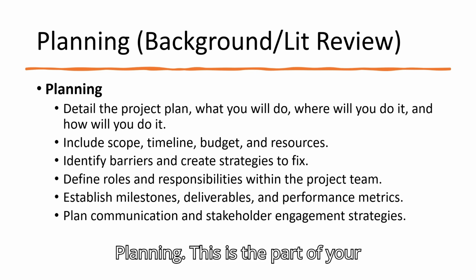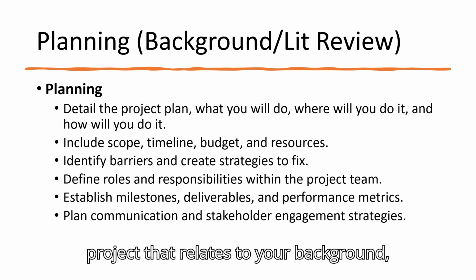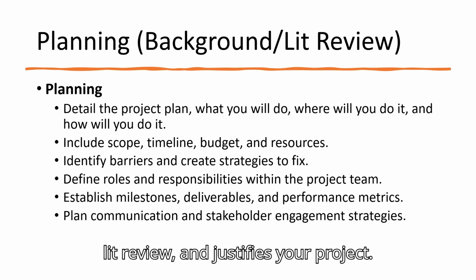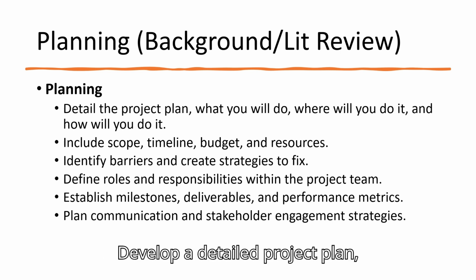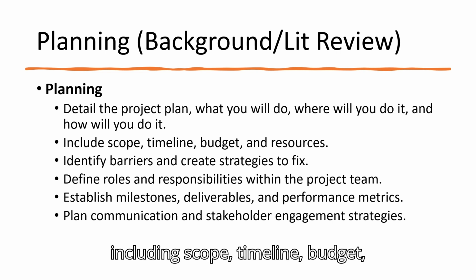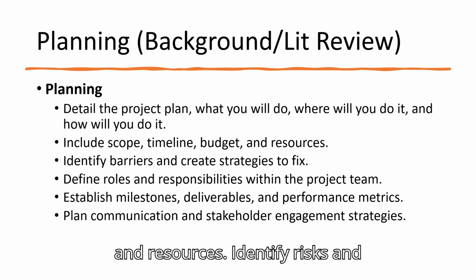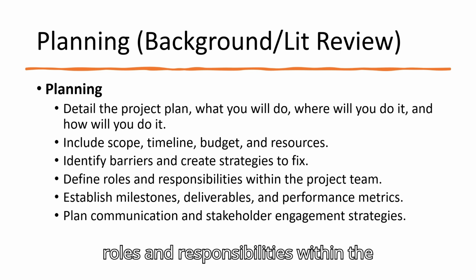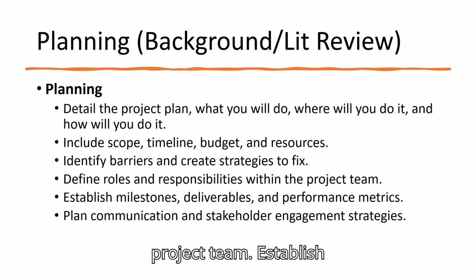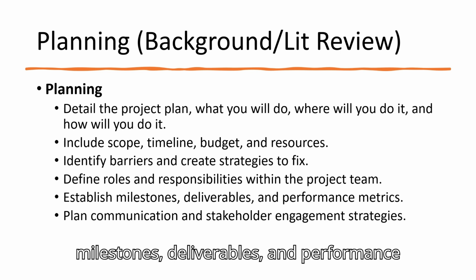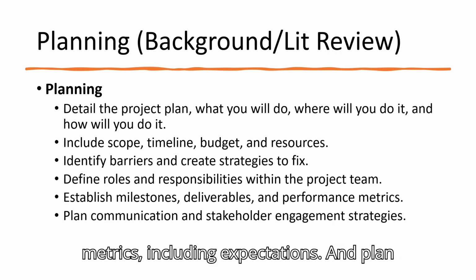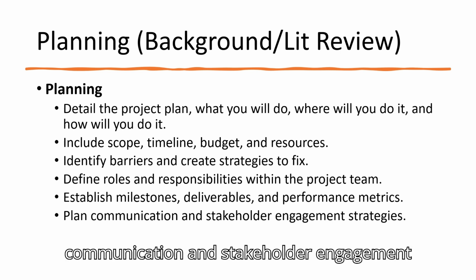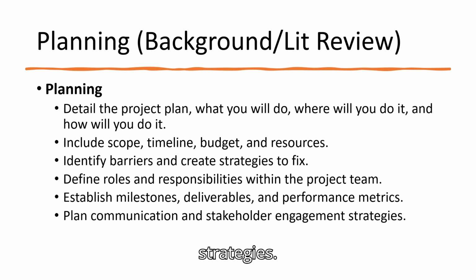Planning. This is the part of your project that relates to your background, lit review, and justifies your project. Develop a detailed project plan, including scope, timeline, budget, and resources. Identify risks and create mitigation strategies. Define roles and responsibilities within the project team. Establish milestones, deliverables, and performance metrics, including expectations, and plan communication and stakeholder engagement strategies.